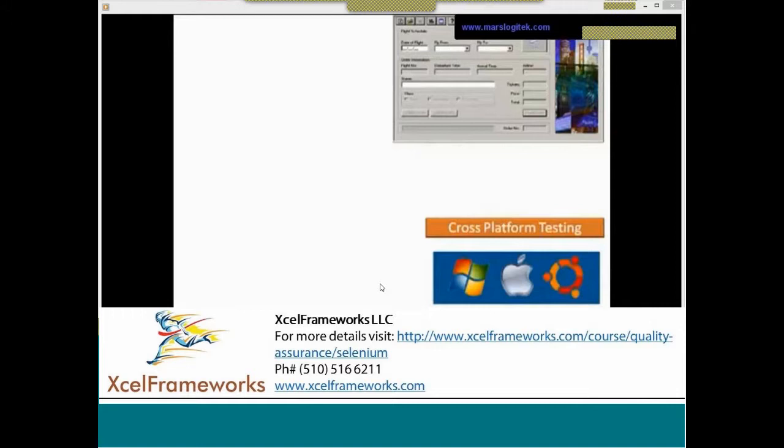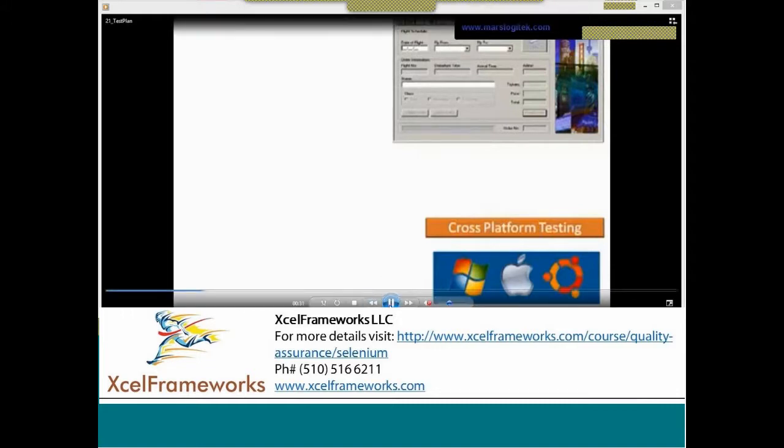Suppose you take the build for the same scenario 6.5, you know that 10 tickets are coming. You also know that a couple of features are coming, and you plan very well that it will take a lot of time to execute the things. And what is the entry criteria to execute these things? You need to mention that the build should be stable. We'll do a sanity check. If the sanity check fails, we are going to reject the build. Correct. So these things we closely mock up in the test plan.